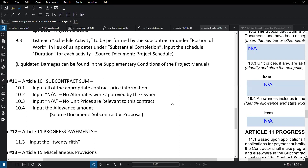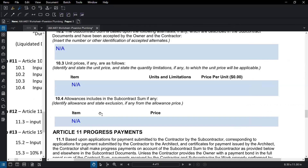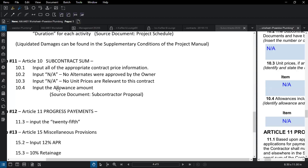Unit prices are not relevant for this project. Under paragraph 10.4, for the plumbing I put not applicable, but if you go to the proposal for Strom Electric - who's the electrical subcontractor you're creating the subcontract for - there is a $15,000 allowance included as part of his base bid amount of, if I recall right, approximately $250,000. That needs to be identified in the contract, and so under article 10.4 you're going to be inputting that allowance amount that's part of your subcontractor's proposal.